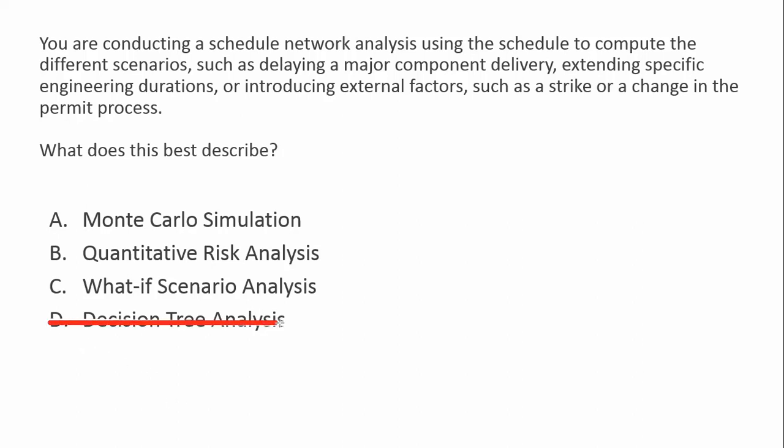The next one says, what if scenario analysis? Now, this is not a bad option. What if scenario analysis is pretty much tweaking the schedule, seeing the effect of that tweak in the long run. You're not changing the schedule finally, you're just doing a what if type of experiment. So using the schedule to compute different scenarios, if I delay this component delivery, what happens to the rest of the schedule is actually not a bad option. So let's leave what if scenario analysis.